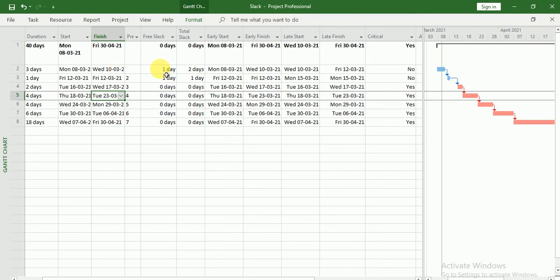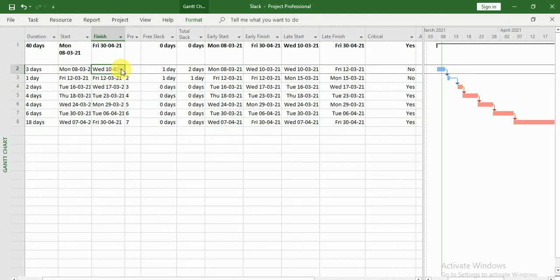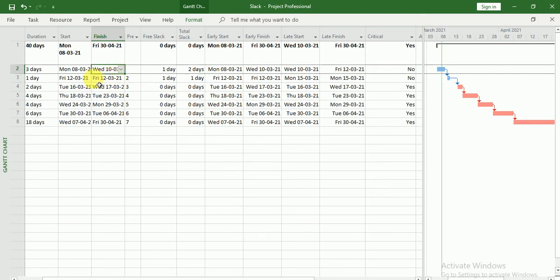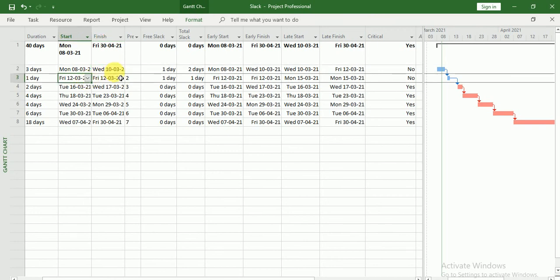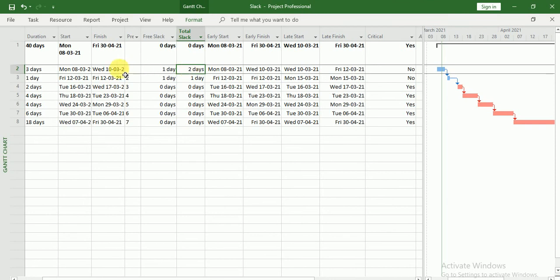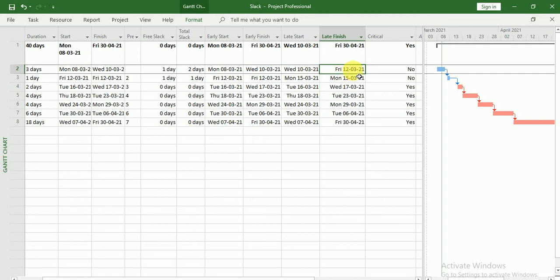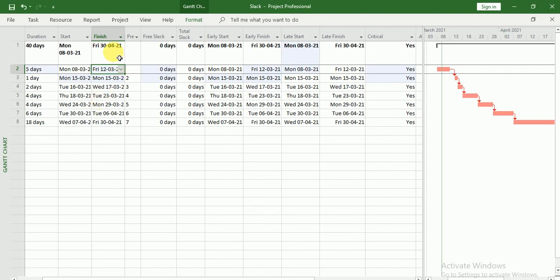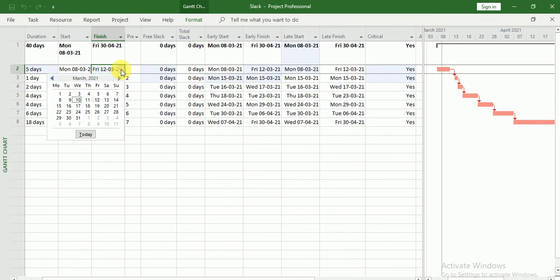So here you can see we have one day free slack here and one day free slack here. This task I can delay by one day, this task I can delay by one day, but I cannot delay this task by more than one day, otherwise my next dependent task will be delayed. And this task I can delay only by two days so that my project finish date will not be hampered. Here you can see I can finish by 12th of March only — if I finish beyond 12th of March, my project finish date will be changed. If I do it 12th of March, my project finish date is still not changed, but all my tasks are critical, meaning now I cannot delay this task at all.